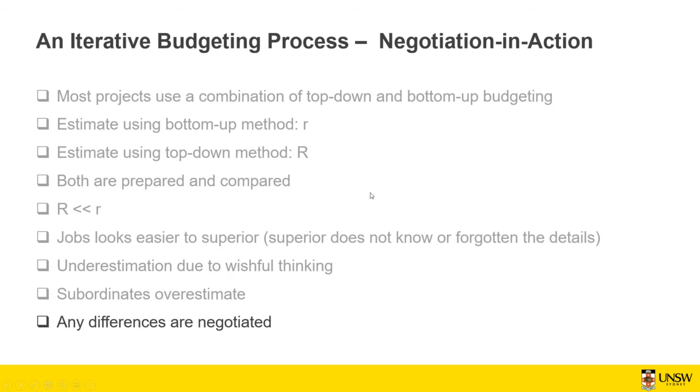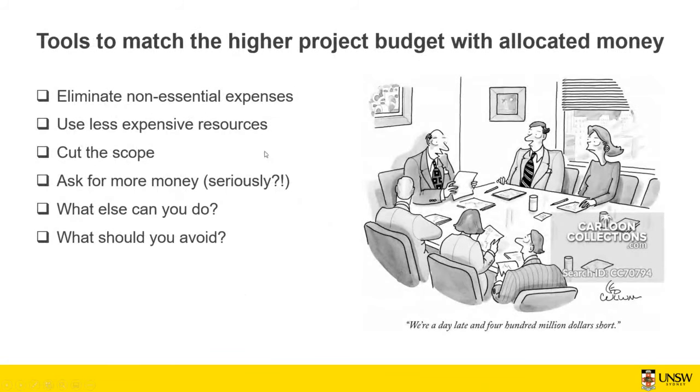But again, this is going to be a very time-consuming process. So if you have a very big project with a lot of work elements, or your scope is not clear at the time of the budgeting, then perhaps this is going to take a lot of time. So in that way, probably the top-down method is going to be more helpful.